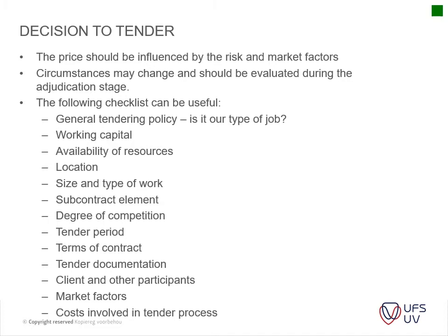So the decision to tender is always a very important thing, especially if you are short-handed and you don't have a lot of capacity and you need to prioritize on what needs to be done. So the price should be influenced by the risk and market factors. So you have to assess whether you want to tender on this project. Is it worth the risk or not? And then your circumstances may change and should be evaluated during the adjudication process.